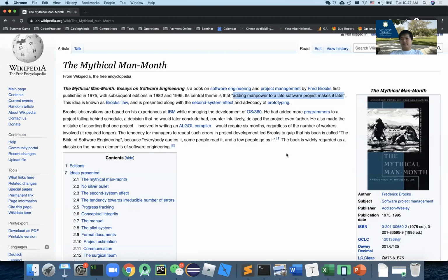It's very true. Think about it: if you have a lot of bugs and you add a new developer, they can't really start making changes right away. They need to spend so much time understanding, and you need to help them understand. And then they start to make some new changes, which may cause new problems, right? But in a lot of other projects, adding manpower will help. The best example would be building a house at a construction site. I think getting more manpower will help there, right? That's really something very special about software development, right?